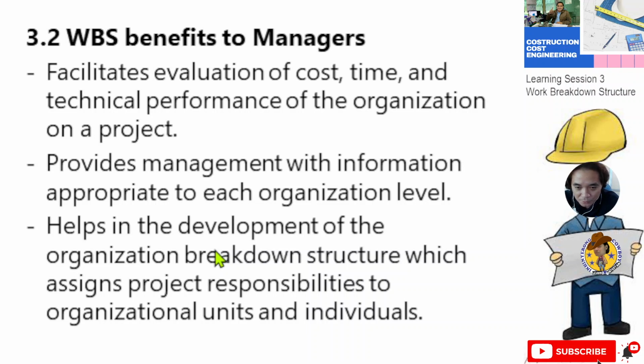Number two, it provides management with information appropriate to its organization level. Number three, it helps in the development of the organization breakdown structure, which assigns project responsibilities to organizational units and individuals.